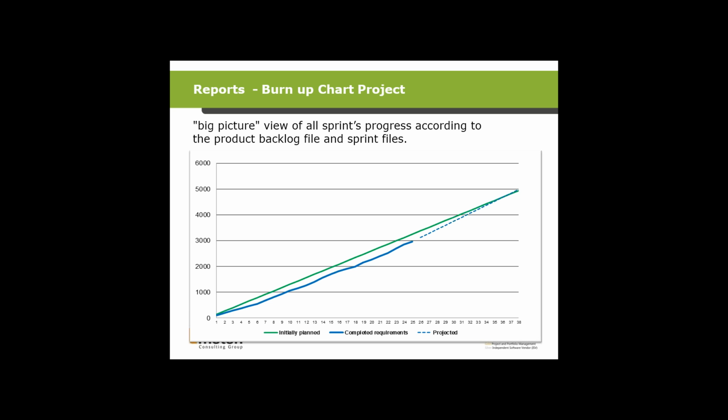And then it's very hard to focus on what I'm supposed to be working on today. So if I have a 4,000 line project file, it becomes harder to manage. So breaking it down into sprints, the way that you work in Agile, really helps the teams focus on the user stories that they're committed to finishing during the current sprint.